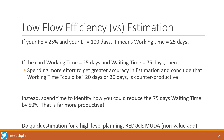It makes far more business sense to figure out how you could reduce the waiting time. Do a quick estimation for high-level planning — lean thinking is very clear that estimation is a waste, just possibly an essential waste. The least amount of time spent to get the level of estimation that helps you do a basic level of planning would be adequate for the purpose.